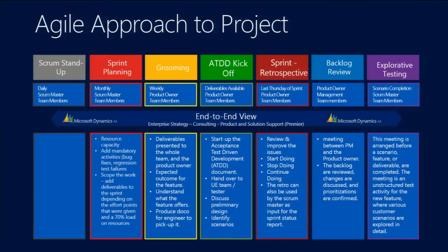In an ERP project where we've got a timeline, the approach is good, but also what I find in an agile project is it just never seems to end. The sprints just keep on coming. And the project then can actually push out a lot more. And I've been through situations where that's been very, very relevant. The end date becomes nigh because we just find more and more functionality and we add more and more sprints to the project. So that's one thing that we need to be very careful of when you're designing that sprint model at the front.